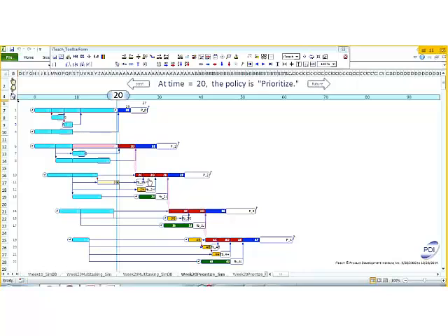Now you might notice that each of the project buffers is getting slightly bigger. That's because in this model that I'm displaying, I don't have capacity buffers, so I'm expecting on the release of the drum from the earlier project to immediately start the later project. Because I don't have any capacity buffer in the model for the drum resource, I'm increasing my project buffers to account for the possibility of a late release of the drum resource.